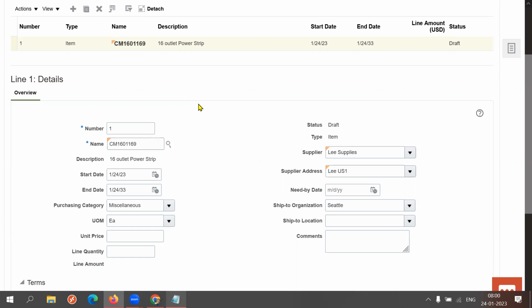Suppose, in the bridge construction example, we configured foundation as phase 1, and the government has to release the payment for that fulfillment 1. Here the supplier is nothing but the government. Based on the due date, the PO gets created automatically. To the PO we attach the supporting documents or photos, and it is sent to the supplier, which is the government here. So we are going to create the government as our supplier.